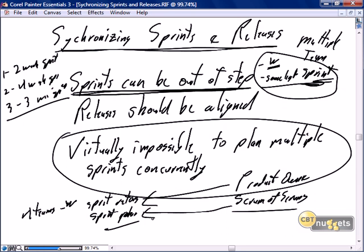So there's lots of good reasons for the sprints to be staggered. Maybe we want to have team one finishing on Mondays, team two finishing on Wednesdays, team three finishing on Fridays, and so on, to allow our sprints to spread, to distribute the effort, the focus of the sprint retrospectives and the sprint plans appropriately to manage the workload on our product owners, on our cross-functional teams, et cetera, et cetera.